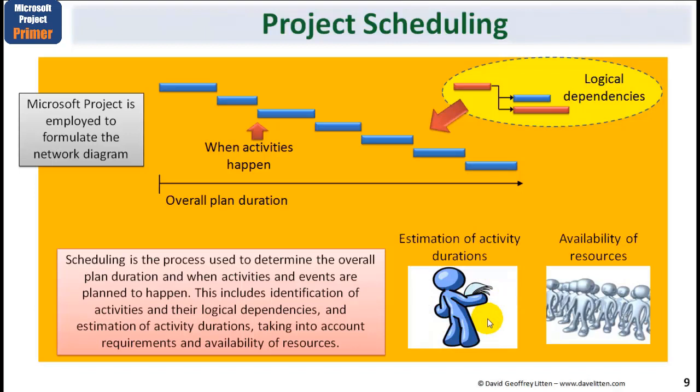The other element which will result in a realistic schedule is, of course, the durations derived from the estimation of the work effort within each task. We'll touch on this in later modules, but for now, just consider the fact that if someone needs to carry out 40 hours work to create some product within a task, then the duration of the task will be based entirely on that estimation being as close and correct and accurate as is possible.